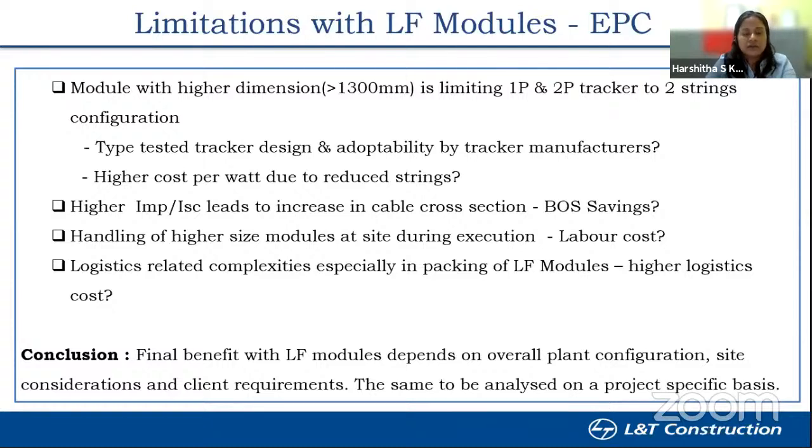Logistics is another complexity which is adding, which was touched upon by the earlier speaker as well, because logistics is one of the prices which has highly increased along with the module price increase that we are seeing in recent days. And for an LF module, it is not possible to be stacked in a similar manner as the earlier format modules because of size constraints. Now special packaging is also being considered where they are getting stacked vertically and other considerations. So will that result in higher logistics cost, which we also need to work out along with the module suppliers.